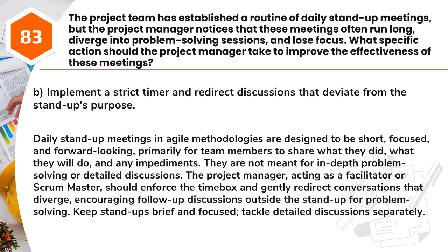Answer: B. Implement a strict timer and redirect discussions that deviate from the stand-up's purpose. Daily stand-up meetings in agile methodologies are designed to be short, focused, and forward-looking, primarily for team members to share what they did, what they will do, and any impediments. They are not meant for in-depth problem-solving or detailed discussions. The project manager, acting as a facilitator or Scrum Master, should enforce the time box and gently redirect conversations that diverge, encouraging follow-up discussions outside the stand-up for problem-solving. Keep stand-ups brief and focused, tackle detailed discussions separately.